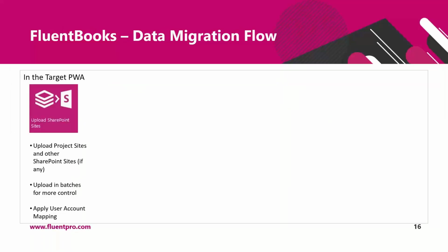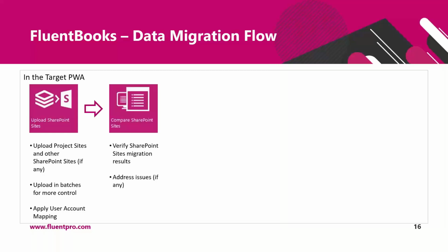And the next step is to upload project sites and other kinds of SharePoint sites if you have any. We also recommend to upload in batches for more control and to apply user account mapping for correct migration of person fields like created by, modified by, assigned to, and all other kinds of person fields.